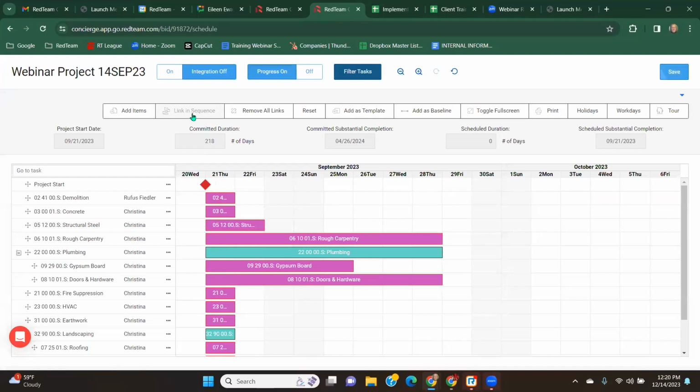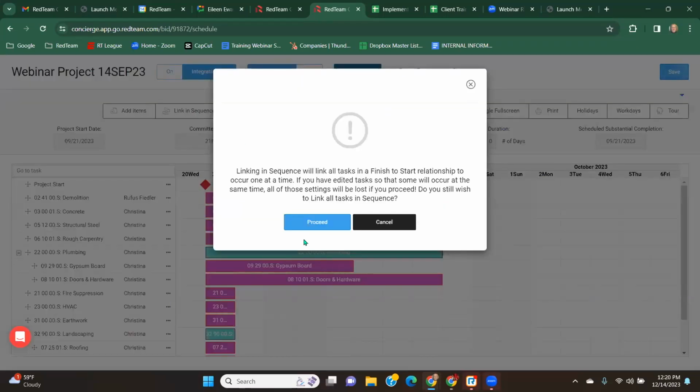So if I click on link and sequence, it's going to ask if I'm sure I want to do this. Again, it's telling you that it's going to create a finish to start relationship.